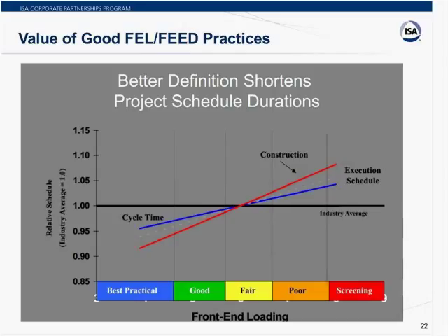Well, this is Charlie. I'll jump in. Many of the examples that were given as either new areas or innovation areas or value-improving practices, things like facilitated graphics discussions, S88 optimization, in our experience, those activities are not something that controls engineers do in a dark room where nobody gets in. It's actually an interactive process that you have to facilitate with the plant floor folks, with the operations folks, and they're actually engaged in those planning and decision-making activities. And then after that's done, the rest of the configuration can happen pretty methodically. But I would say it's absolutely essential to have their involvement early on.